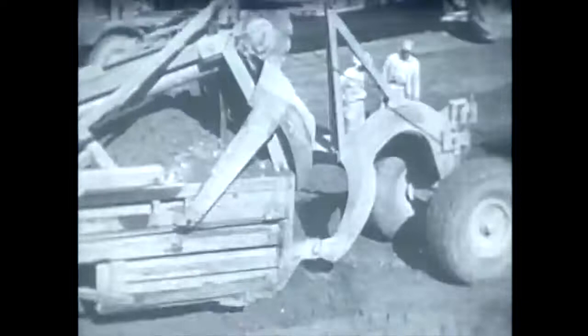Occurred on November 18, 1952, and that same day, the cats and scrapers churned the landscape to level out the rolling farmland for the building foundations. To provide a suitable area for constructing the process and auxiliary buildings, a tract of land roughly 4,000 by 6,000 feet was graded to minimum slopes for surface drainage.